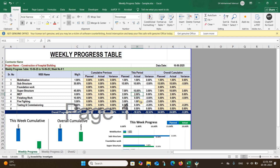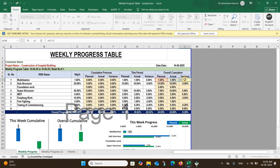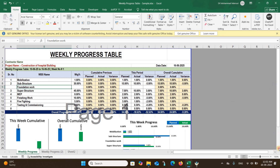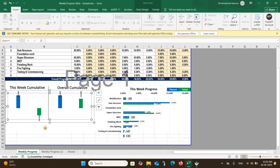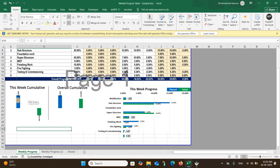The overall cumulative is calculated by adding previous cumulative works to the current period's total. So the cumulative planned equals previous planned plus this period's planned, and cumulative actual equals previous actual plus this period's actual. As you input all the data, you can also see a visual presentation. This is the chart you can prepare — overall, we have planned for 34% and can see what was actually achieved.